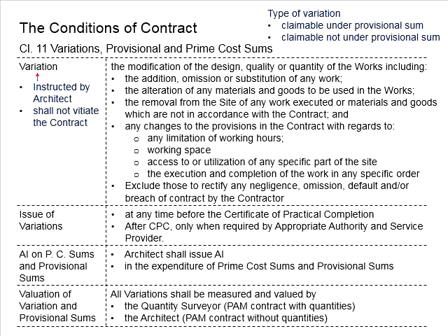There will be one circumstance in which the variations may be involved after the certificate of practical completion. It is only when the modifications are required by the appropriate authorities and service providers. The appropriate authorities is referring to the local authorities, government bodies, departments, in terms of certain requirements, while the service providers are related to the supply of electricity, water, telecommunication services, and others.